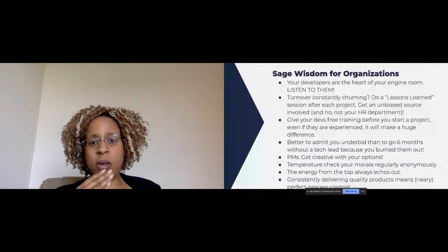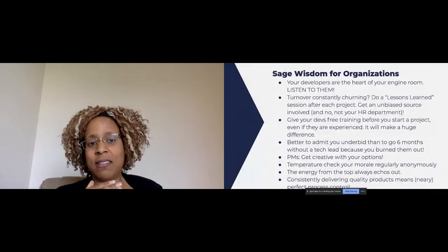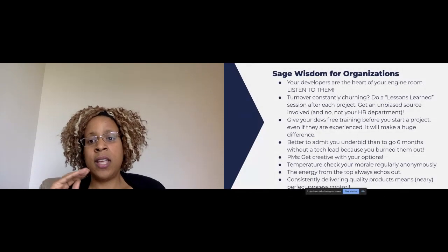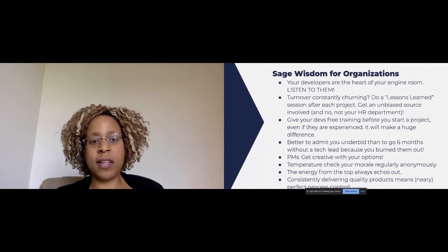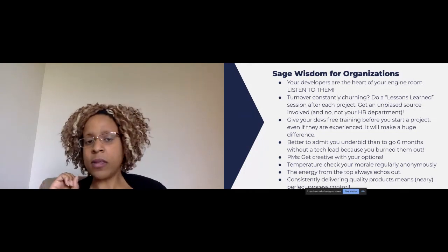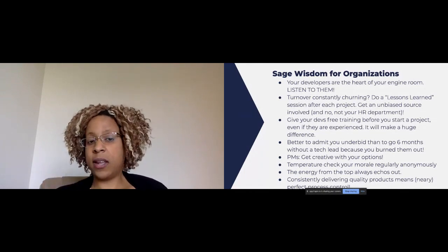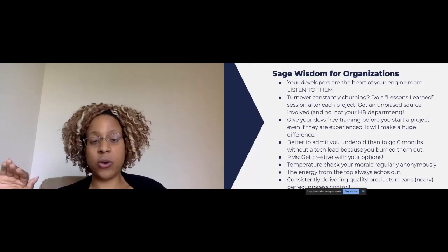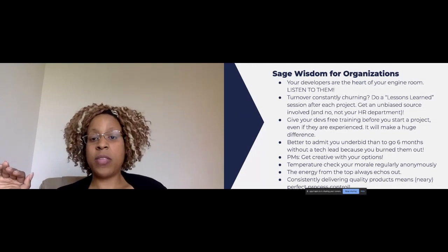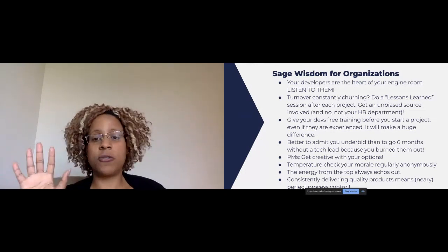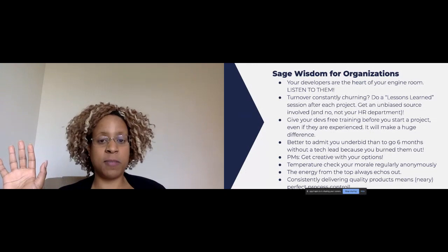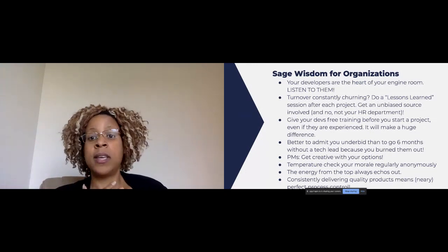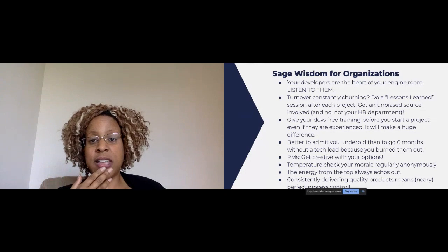Having that voice, don't be afraid to hear it and have that hard conversation. Doing the pros and cons about risk ahead of time are big. If turnover is constantly churning in your organization, we at North Studio do a lessons learned at the end of every single project. What we did well, what we didn't do well, that then propagates back to our executive team. We talk about it without finger pointing. It's an organizational view. It is never one person that's going to be responsible for tanking a project, in my opinion, 99.9% of the time, I should say.